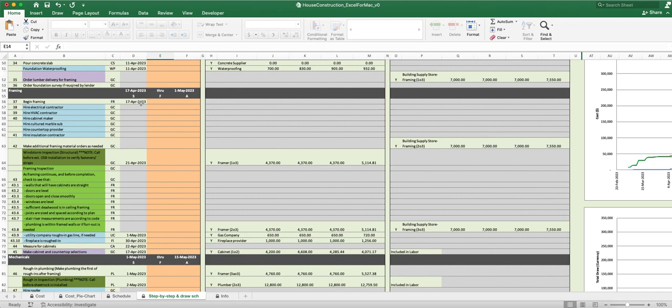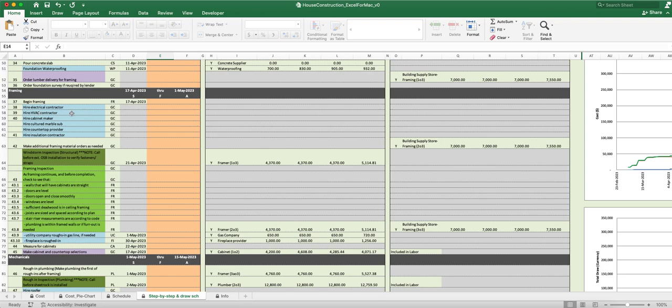You begin framing on 17 April. While you're framing, you want to think about hiring your electrical contractor. You need to be doing that sometime in this timeframe here. The overall timeframe for the framing is 17 April to May 1st. You also want to be hiring your HVAC contractor now, hiring your cabinet maker now, your cultured marble or countertop provider.